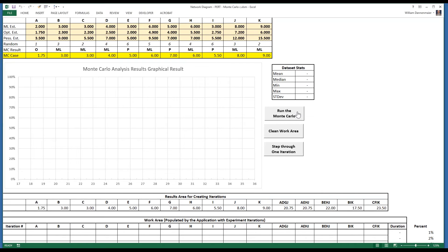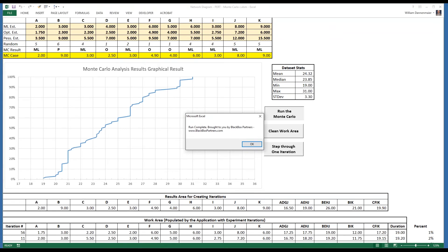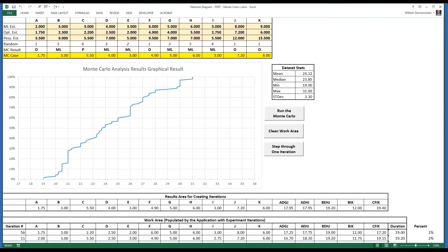For a Monte Carlo to be done in a professional setting, you would want to run through 10,000 iterations to make sure to capture even the most unlikely of possible scenarios. Click the Run the Monte Carlo model.